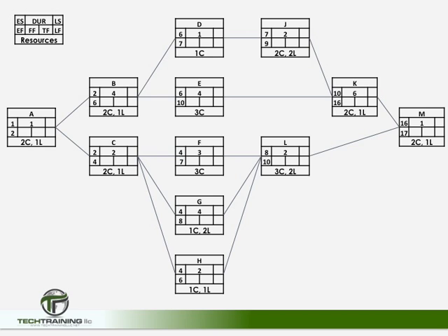And we can now move forward to activities K and activity M, which completes the forward pass. And by completing the forward pass, we now know that the earliest possible time to finish this project, again, providing everything goes smoothly, is 17 days.